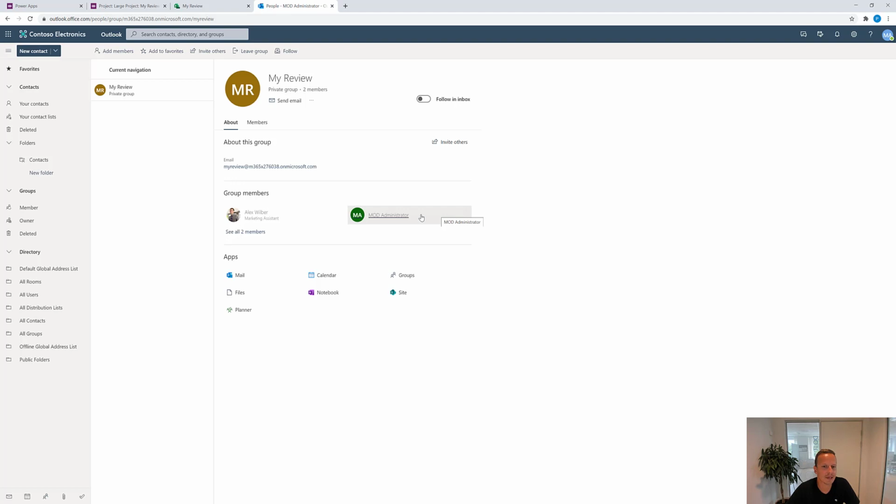So that's, again, one thing to be aware of. If you change the project manager and you have already added a person or the project manager to a task, then you can end up in a situation where you're out of sync, as it is right now, with Office 365 groups and the whole CDS/Dataflex security model, and also with what you actually see in Project for the Web.